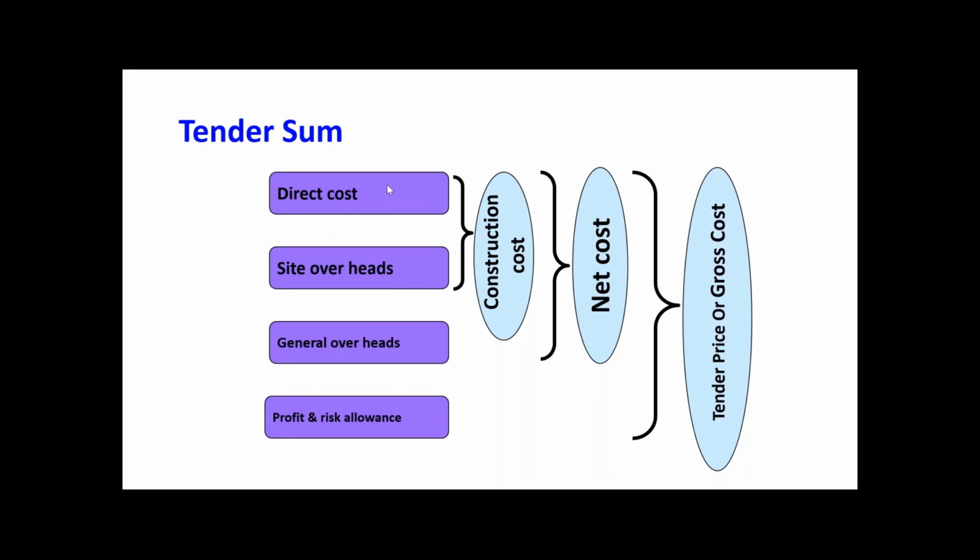Once they have done the direct cost estimation, they have the percentage, right? Say they have 15 percent, assume in total. Now, when they see the proportion of the direct cost they have calculated, they can see whether this total price brings a 15 percent or not. If not, there is some issue with the prelim or with the profit margin. So we have to adjust it, isn't it? This is how they play the strategy to price the tender sum. You got what I'm telling here?